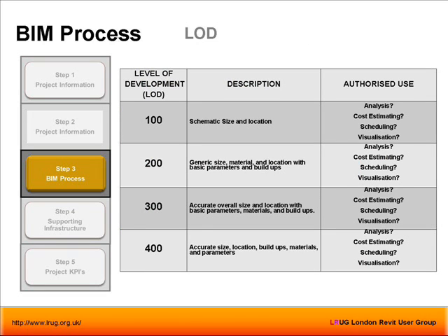Yep. Well, we religiously update that. And I strongly advise that we should, because this is key. If you don't know how many models you're going to work with, then how are you going to collaborate and coordinate? If you have like 25, 30 models, then it is important for the whole team to know that we are in this situation. We have 25 federated project models, and this is how we're going to work. Now, let's say at stage D, you may have 5 models, and after stage D, you decided to split one MEP model into 5 MEP models, then it is important for the team to know that you split your model into 5 different models.